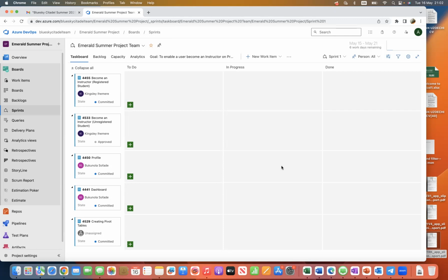I was using an example of a story. I don't want to pick any of your stories. Let's assume there's a team, a group like you are, and you're supposed to decorate the sitting room. To decorate the sitting room, you'll need the plasterer to plaster the wall, the painter to paint the wall, the electrician to fix some things and all that. So on this board, you will have a story, a PBI, product backlog item, user story, still the same thing, that says decorate the sitting room. That's one of the stories or work that has been assigned to that sprint.